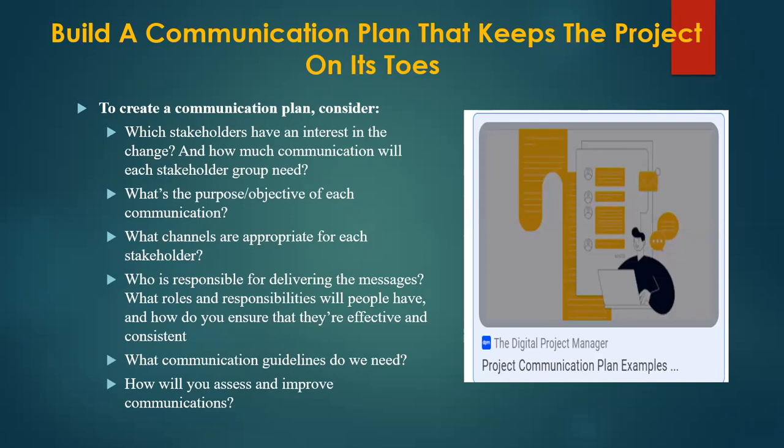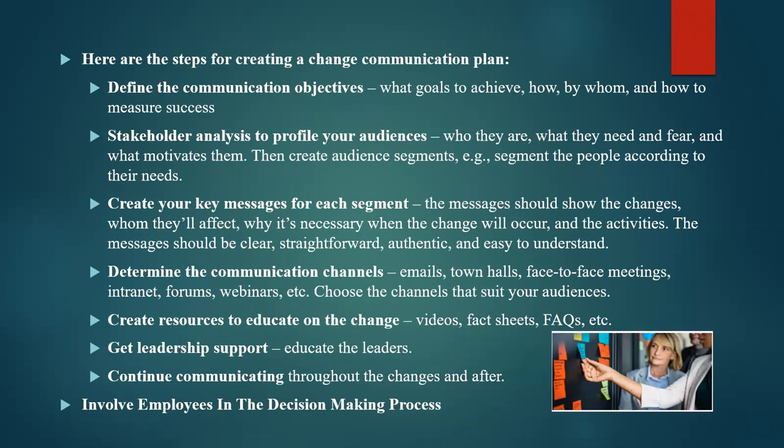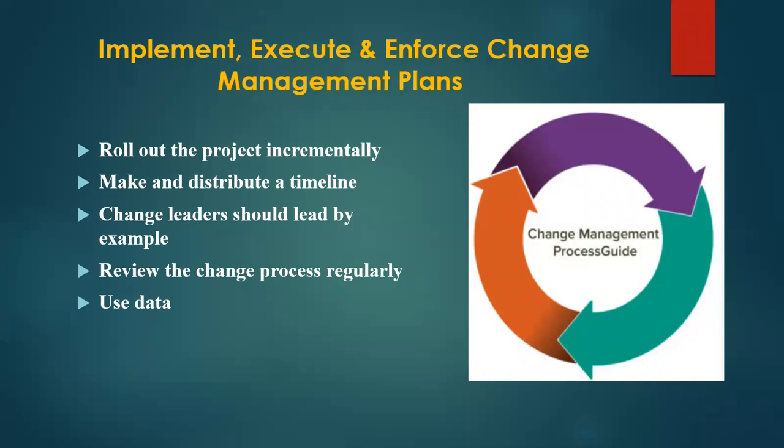In project managers, for this change, and after which follow the steps of creating a change communication plan, which includes defining the objectives, stakeholders analysis to profile audience. Project managers will have to execute. They will have to equally implement, execute, and enforce the change management plan by rolling out the project incrementally, making sure the timeline is set, ensuring leaders of change should lead by examples, and reviewing the process regularly.